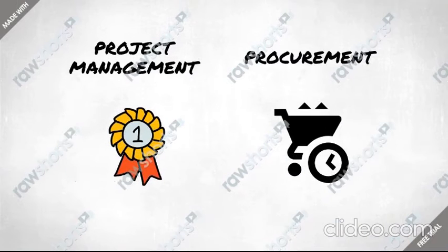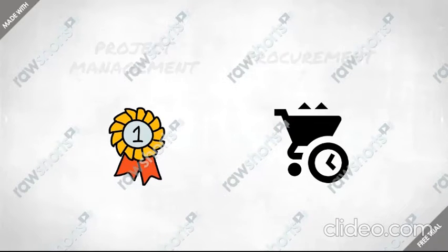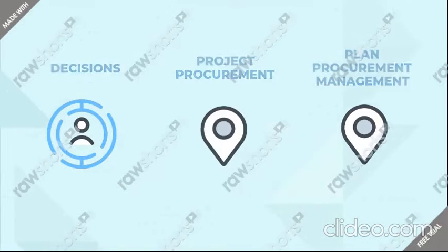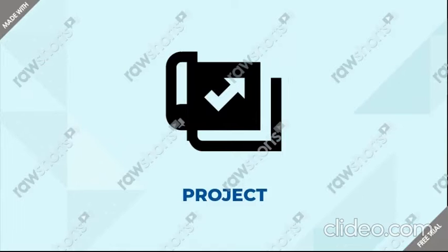Project management for procurement is usually divided into 4 major processes: planning, selection, administering and closing procurements. Plan procurement management is the process of documenting the decisions of project procurement. It is also involved in specifying approaches of procurement and identifying the potential sellers of the project.